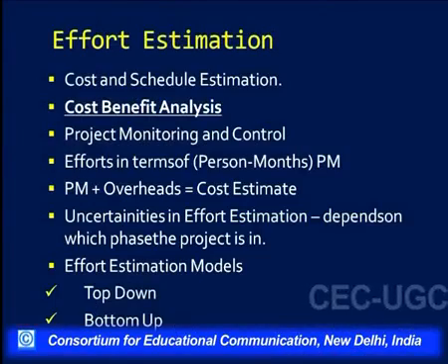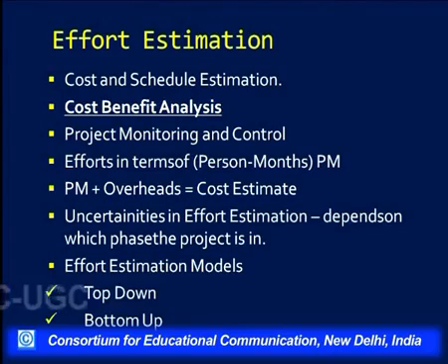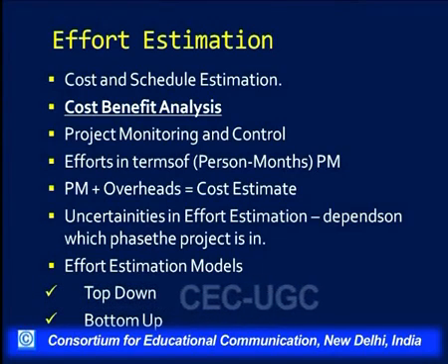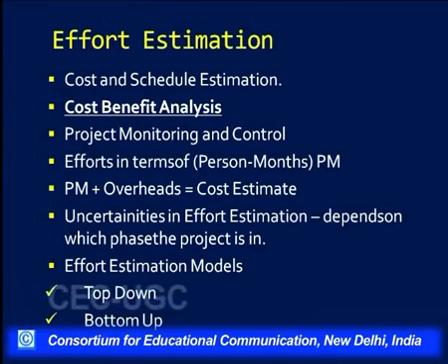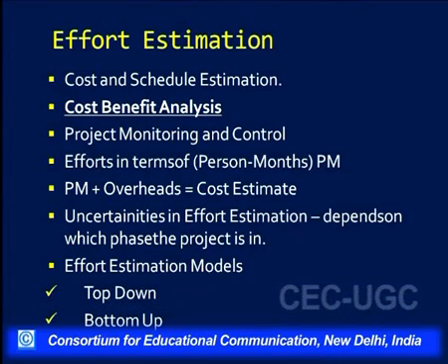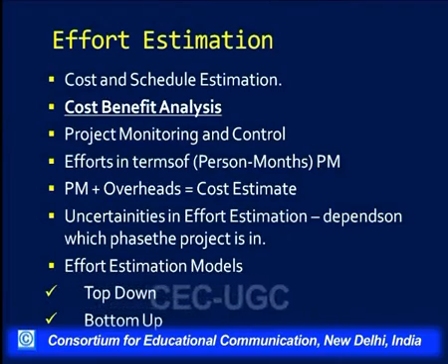After the process has been planned, after it is decided what steps are going to be done, the next important step is effort estimation. How to estimate the cost of the project is very important. In effort estimation, basically two things are done: one is cost estimation and the other is schedule estimation. Cost estimation is very important because based on this estimation only, a cost benefit analysis of the project can be done by the customer, because he will understand that if I am paying so much money towards the cost of the project, what are the benefits that are accruing to me. So the cost benefit analysis is only done after the cost estimation has been done by the project manager.